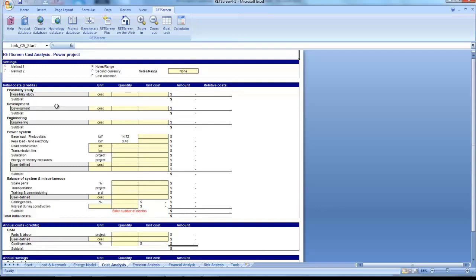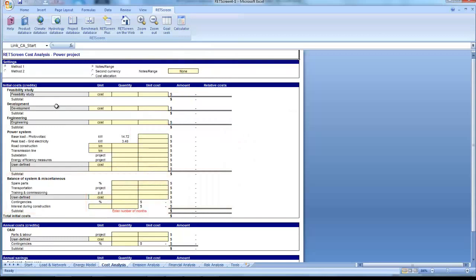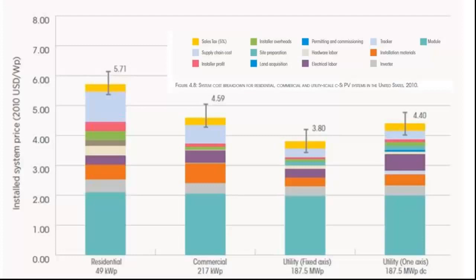In terms of fluctuations in cost data, the balance of capital costs in total project costs tends to vary even more widely than power generation equipment costs, as it is often based on significant local content, which depends on the cost structure where the project is being developed. Total installed costs can therefore vary significantly by project, country, and region, depending on a wide range of factors.